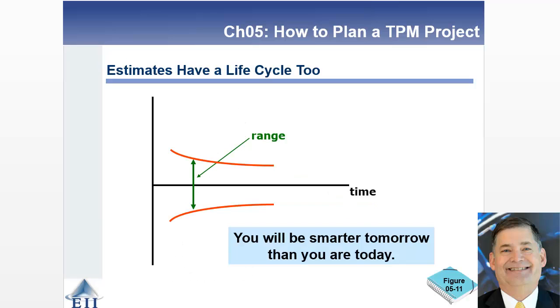All right, these estimates, of course, have a life cycle too. So the basic premise is what's in light blue there. You'll be smarter tomorrow than you are today. The longer you work on a project, the more you're going to know about that particular project and have the ability to estimate better. So you want to refine those estimates over time and make sure that you tighten the range of error, if you will, associated with that estimate.